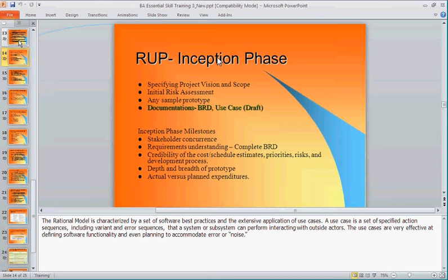Or another way to look at it is, if you are behind by 25% in your first leg of the journey, then you're 25% behind for every leg of the journey going forward, right? So you must adjust your time estimates and your cost estimates accordingly. So you will evaluate where you stand so far, and make the adjustments if required.